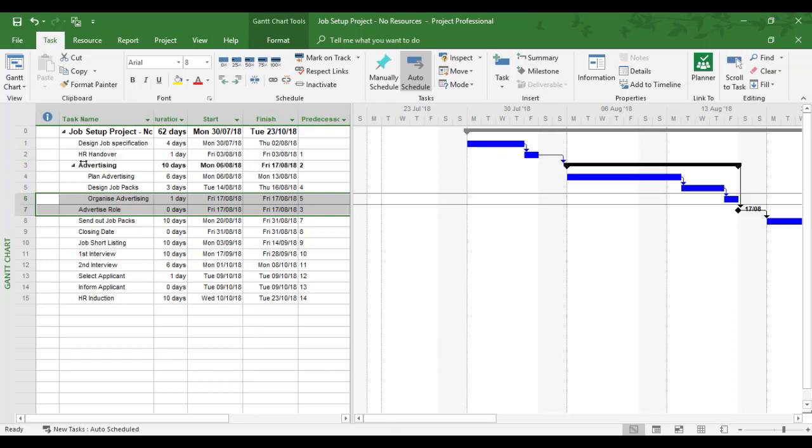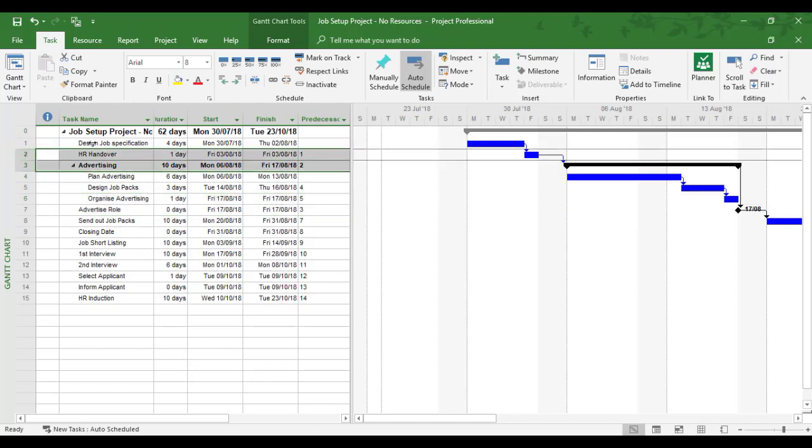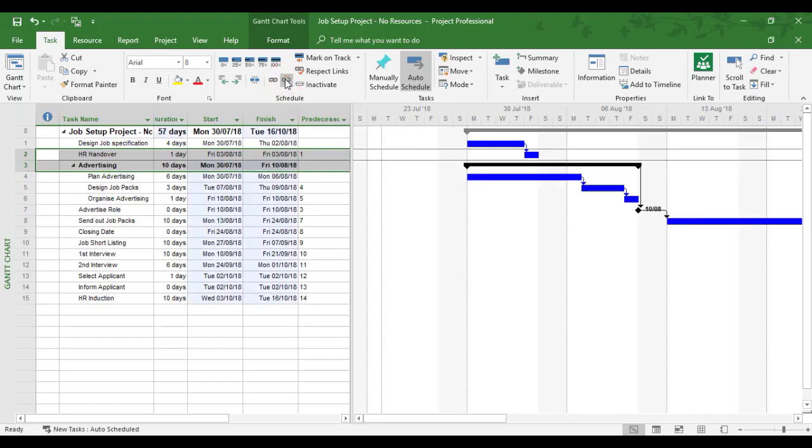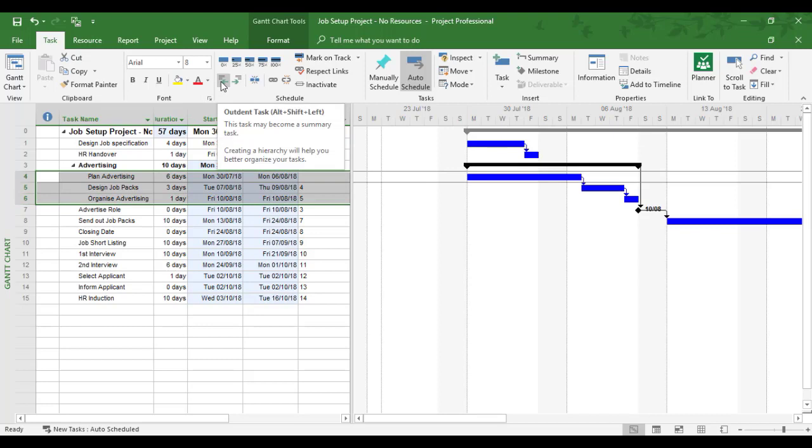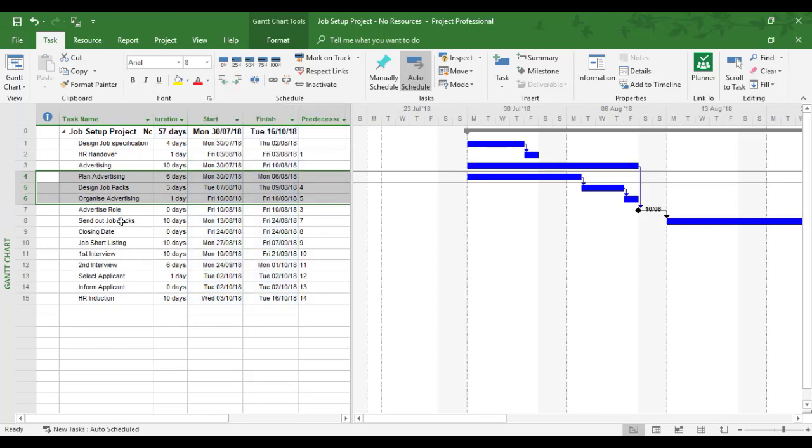And I'm now going to isolate two and three. So I can just work on the grouped area. So I'm going to break that link. Now I'm going to work on the group. Now what I want to do is add a new task after plan advertising to this area. To do this, I'm going to actually highlight the three tasks and out-dent it. It's the green arrow to the left. Right, now I'll start working on inserting a task.